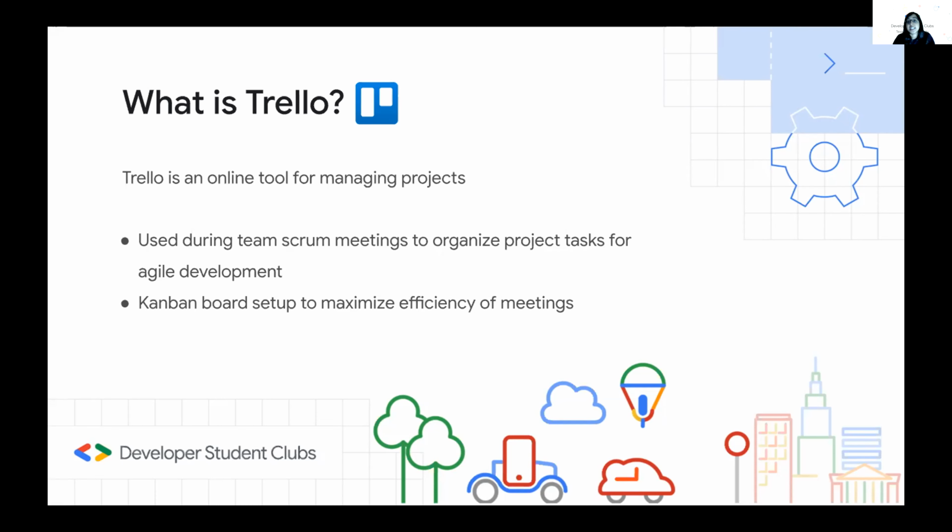These are called Scrum meetings, and usually these would happen every day when you're at work, but looking at us as students, we can put aside about 1 day per week to do this, depending on the scale and the pace of your project. So in these meetings, you would come together and talk about what you've done in the past week, what you plan to do, and if you had any issues that you need help on.